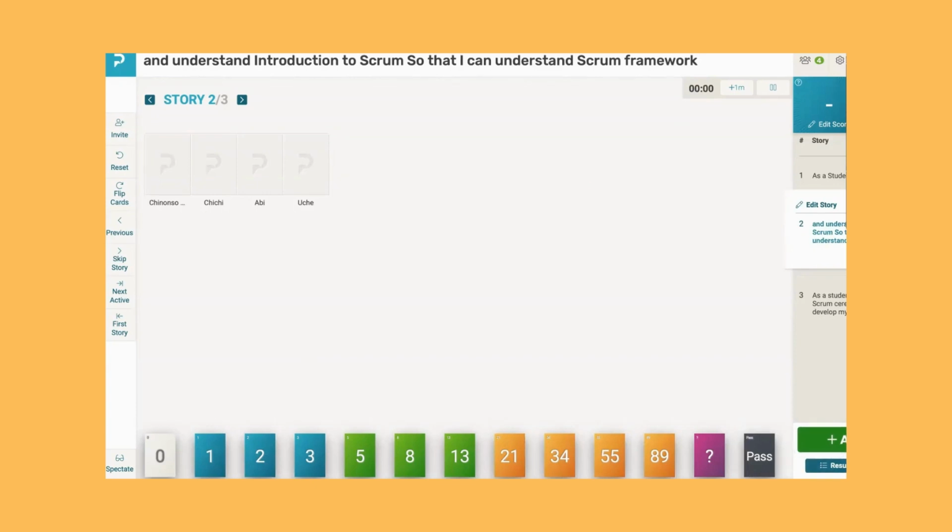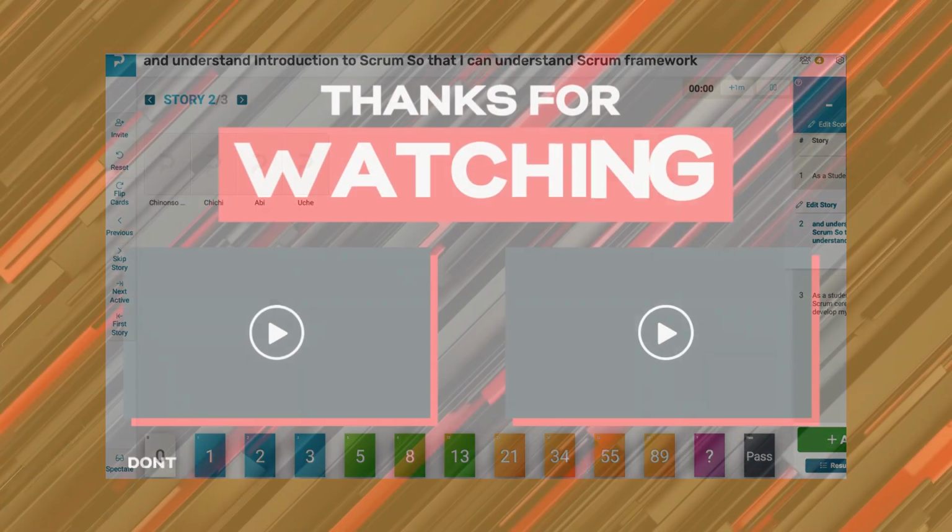And then when I have the team, I go one after the other and allow the team to estimate. And if there is anyone whose number is way higher or lower than the rest of the team, I will ask the person to explain to the team why they think so, to justify their story points. That way the team can make a better decision in their story pointing, right? So that's pretty much it about story pointing. Use planning poker to do those story pointing, and it's super easy, right? Okay, so let's see